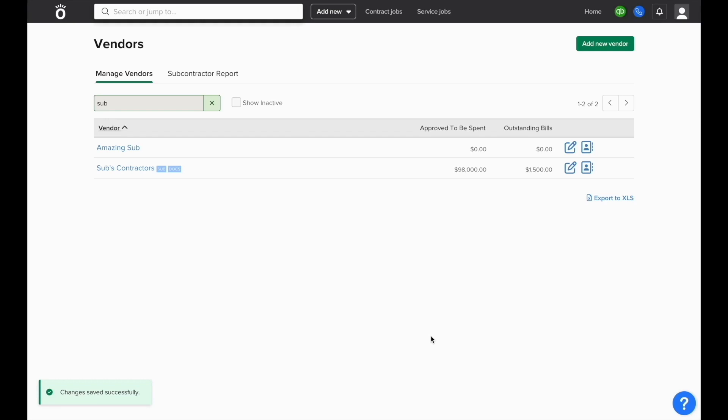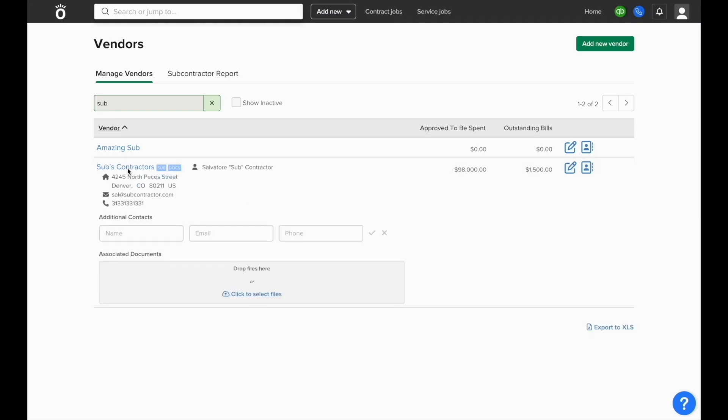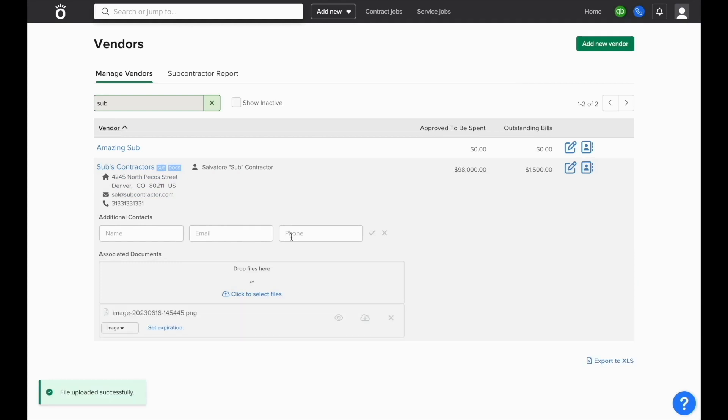Once the vendor is classified as a subcontractor, you can click on their name in the manage vendors screen to upload documents that are relevant to this contractor. When a document is uploaded, you can classify what type of document it is and how long until it expires.